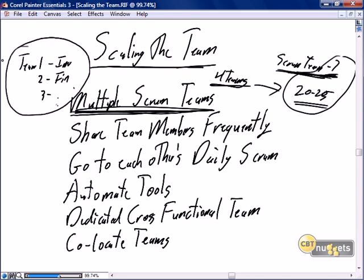And often people will do that to develop cohesive teams. But if you think back to some of the Scrum principles we've talked about already, with there is no code ownership, there absolutely has to be willingness for anyone to pick up anybody else's piece of code. The concept of saying one team is focused on this specific business area and another team is focused on this specific business area is not really very Scrum-like.